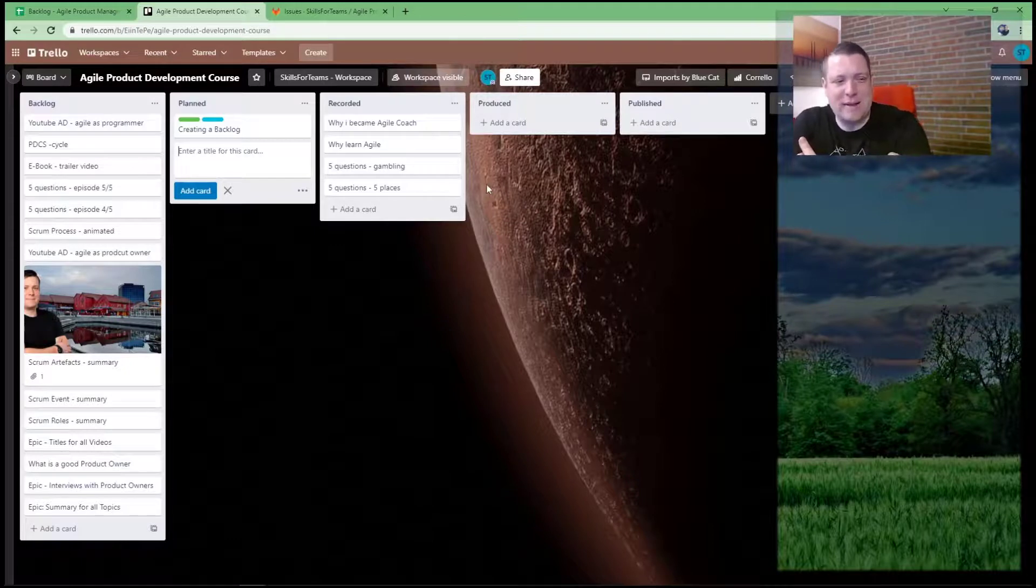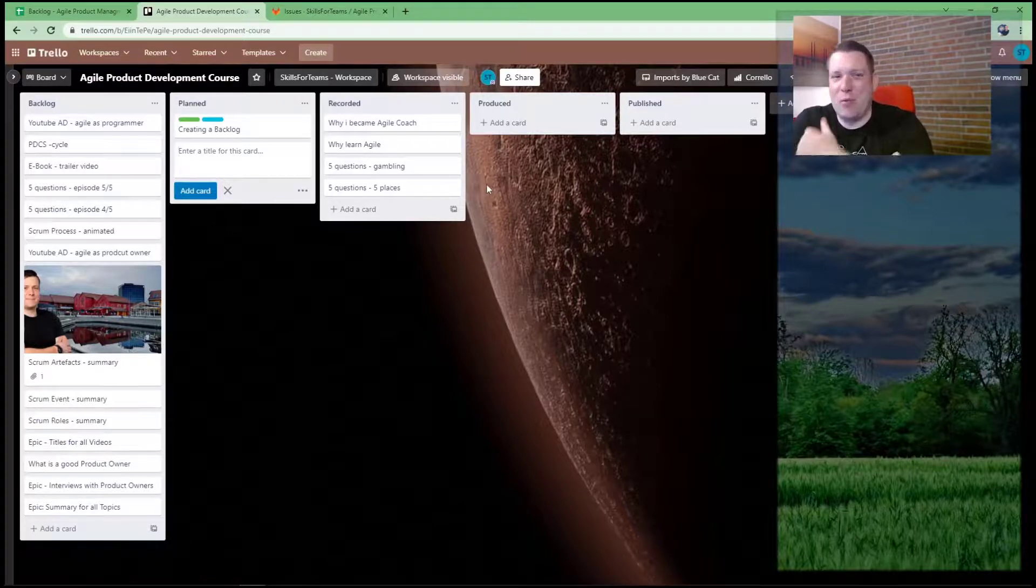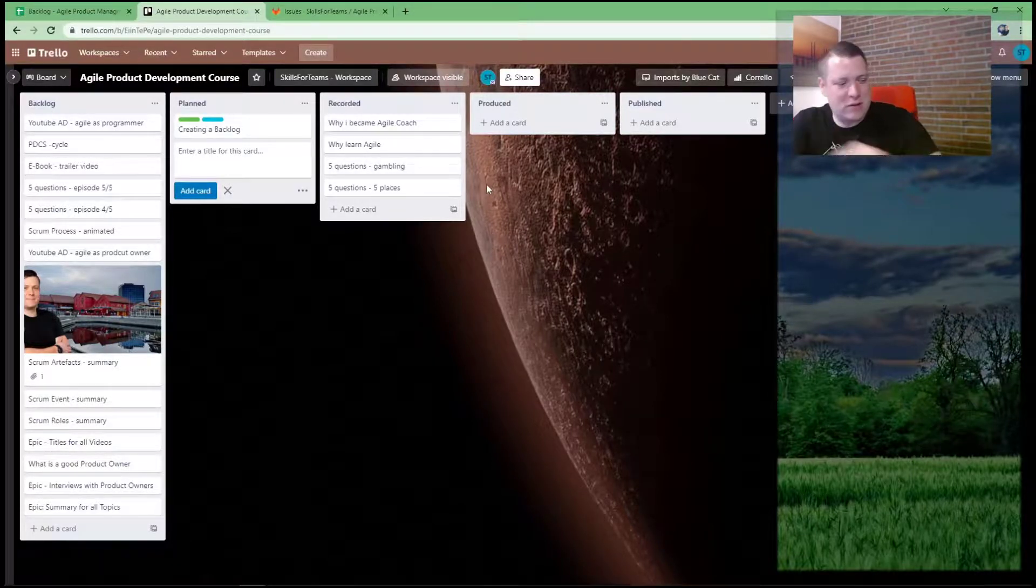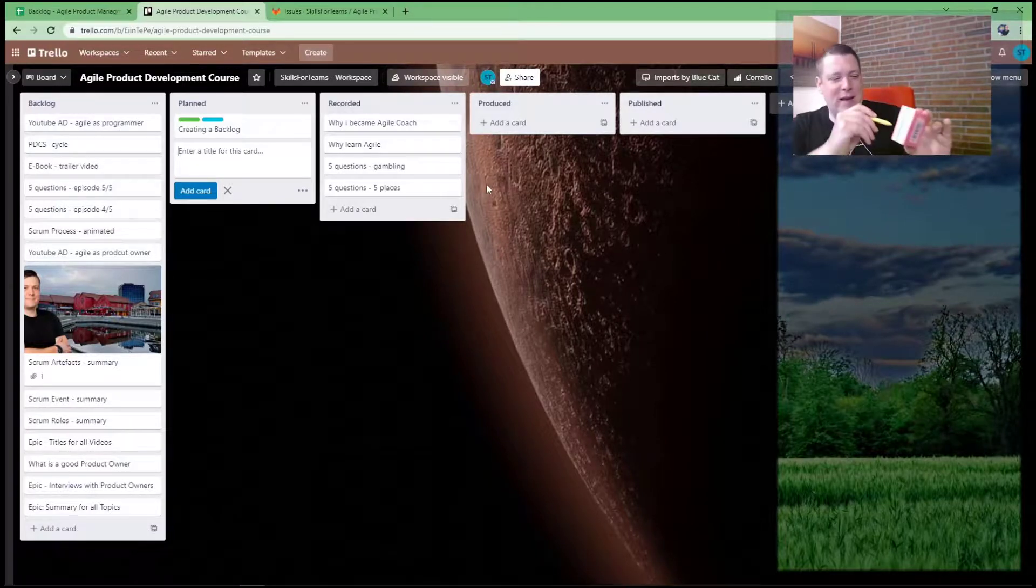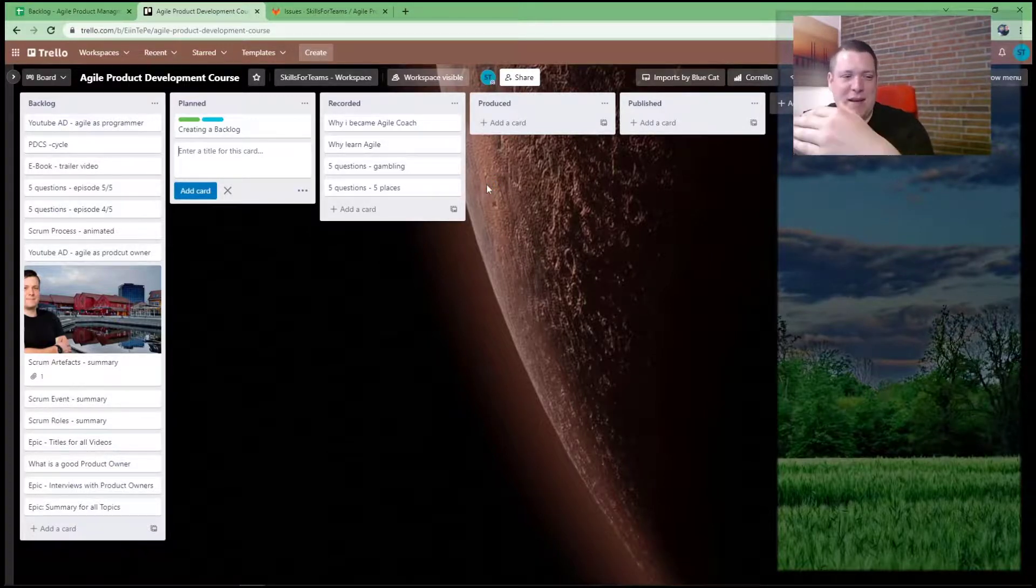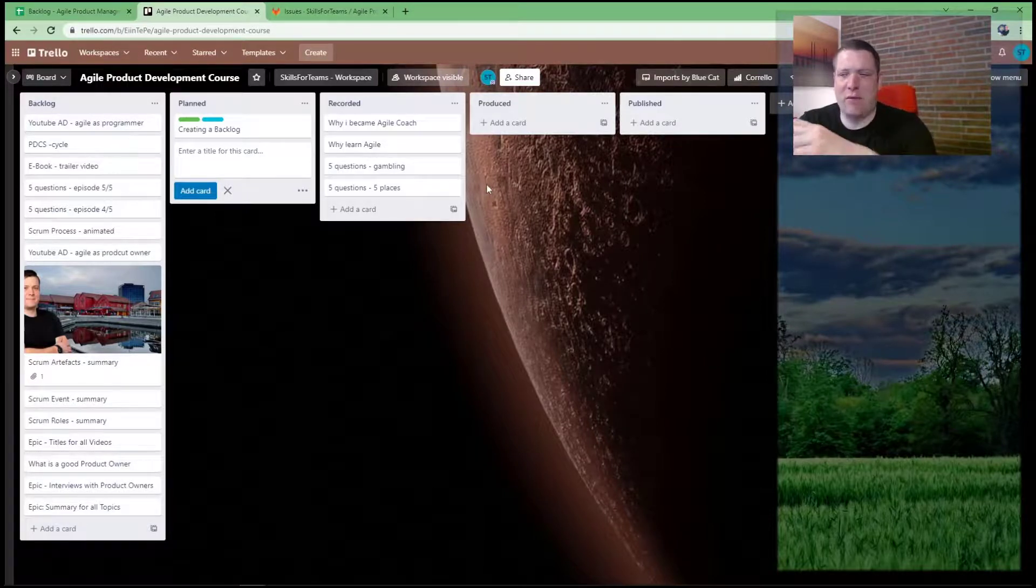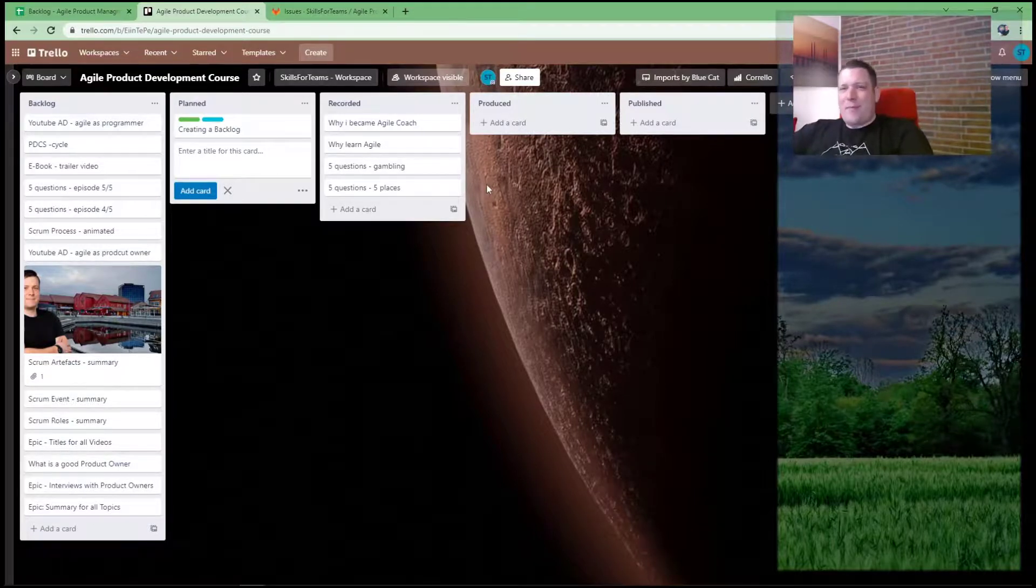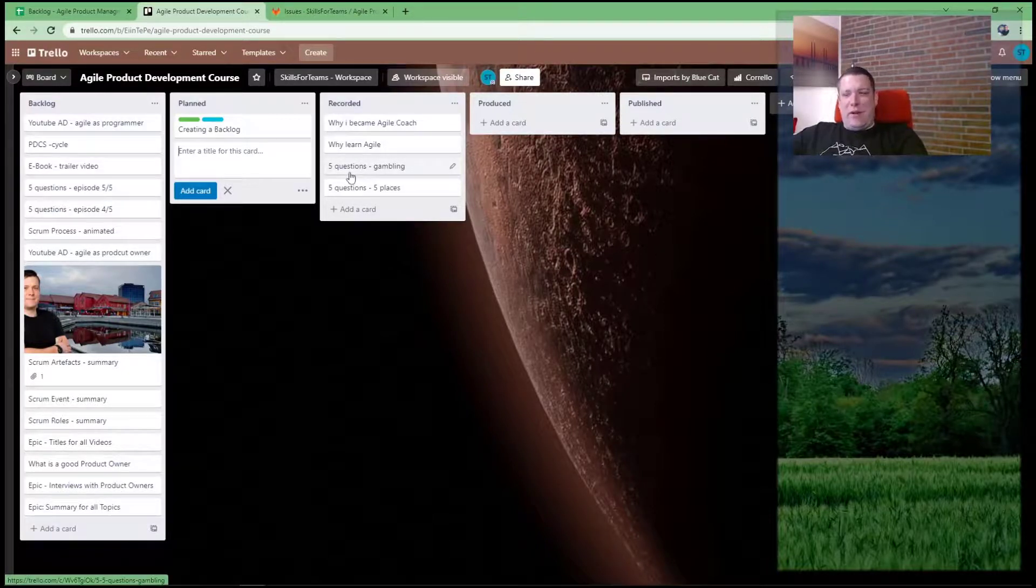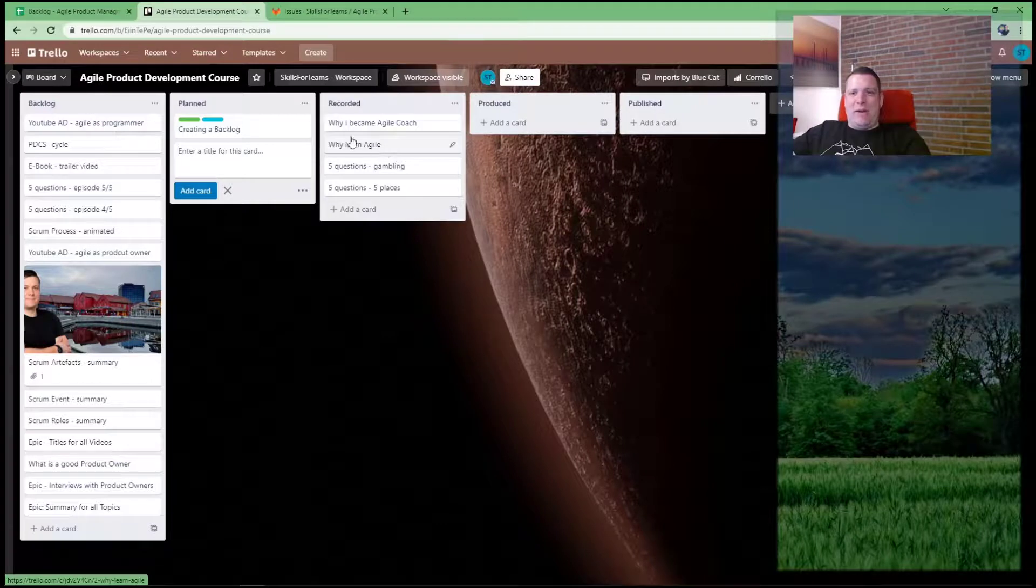You should limit cycle time or keep a watch on it. One trick is like, when we used cardboards with post-its, we were just drawing every day a little dot on it. And if something has three dots or longer, longer than three days, we thought it's a problem and we went all together to solve it. So actually it can uncover stuff, but it's not going that fast. And my next task is to fix this one up to get all recorded stuff out. And then I will maybe implement mechanism to do that faster. Maybe get better in video cutting. Maybe get faster in video cutting. Well, just more trained to avoid that.